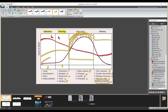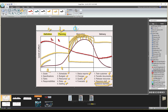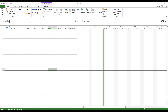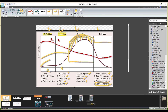In this area, you will see that project managers often don't want to revisit lessons learned — there are good moments and bad moments, but people don't want to go back to the bad ones. This is also a problem because sometimes we avoid documenting due to legal issues. One good approach is to keep a separate PM log — that is one way you can record lessons and go back to it. It should not be negative; it should be positive, so that you can review it and improve efficiency on future projects.